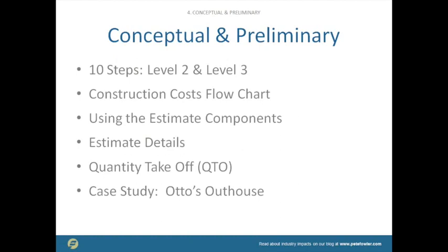If you have an estimating program like Xactimate, that's a pricing program, I would argue. But you can see there's flooring and wall covers and wall finishes and painting and base and case, and you can break it down that way. The question is, who's going to do it, how long are they going to take, how much do they cost to have on site, and what's a reasonable amount of overhead and profit, etc.